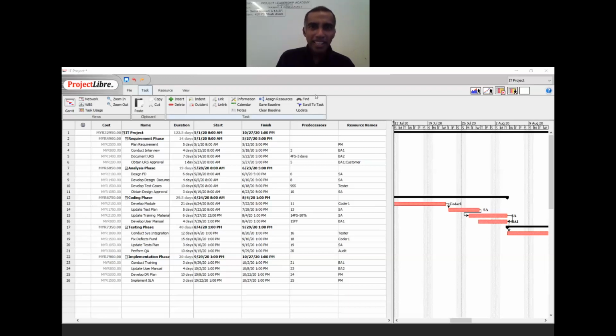Right, but if you notice, this one does not divide by 22. ProjectLibre is actually defaulted to 20 days per month. So you've got to customize it. You've got to modify some settings to make it 22, right? But for now, it's using 20 days, 20 man days. So that's how easy it is to set up a resource.